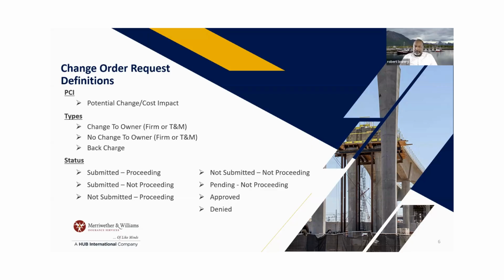Then they also will look at the cost of, what is your hourly rate? If at the end of the job you've got quite a few approved under protest, they might come back and say, hey, can we go through some of these change orders? I've had that happen on jobs where I had to go through a lot of change orders at the end of the job, even though it was approved, because then we had to negotiate pennies on the dollar because they were over budget and couldn't go back to the owner for additional money. And as we all know, when you do these change orders, some of these numbers are padded. So you're like, okay, I can give up a little bit, but you want to make sure you're still making your profit.